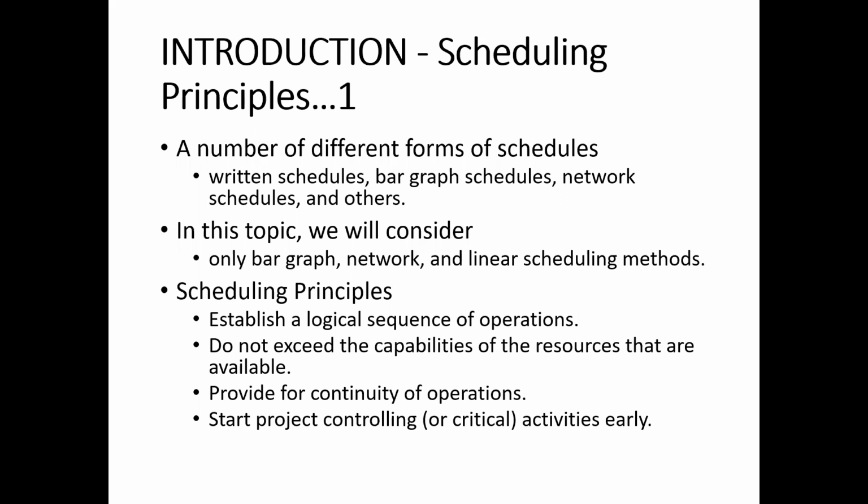When you want to pour concrete, there are certain activities which must be performed in sequence. If the pouring of the concrete is for a slab, there should be formwork first, and then the reinforcement or steel bars should be placed.